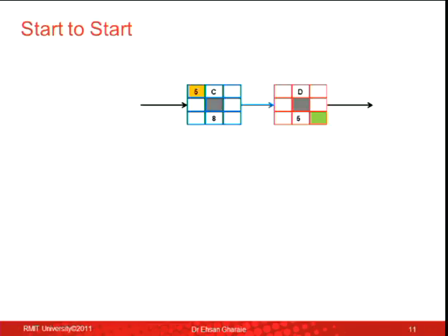Nope? Okay. So now let's see how we calculate those early starts, early finishes, late starts, late finishes, and all those dates when there is a start-to-start relationship. So at the moment, this is just normal. Just as a quick reminder, if this is 5, when should be the early finish of C? Guys, wake up. What's the early finish? 13. Fantastic. So 13. When is the earliest start of D? 13. Early finish? 18. Okay, so this is just normal. That's a reminder from last week.